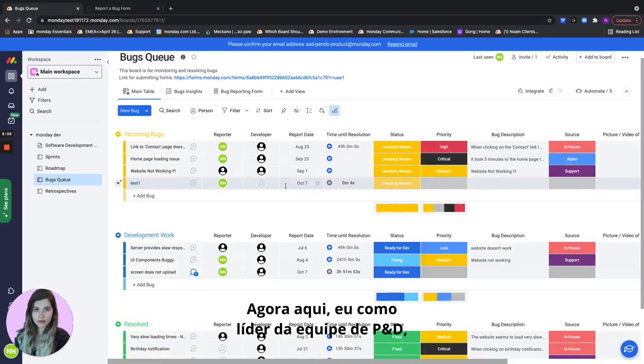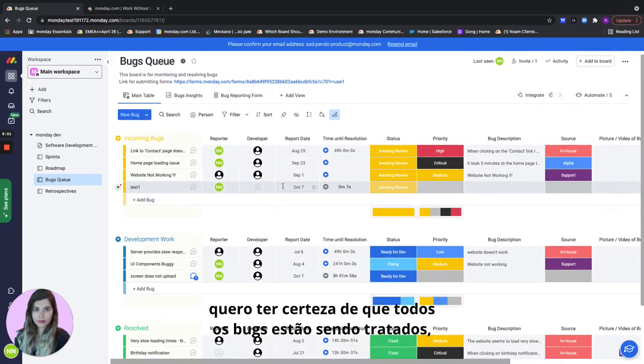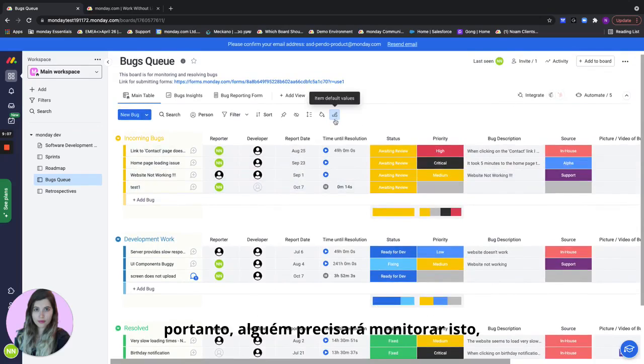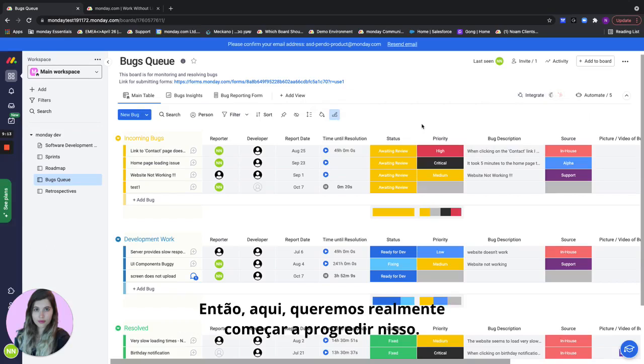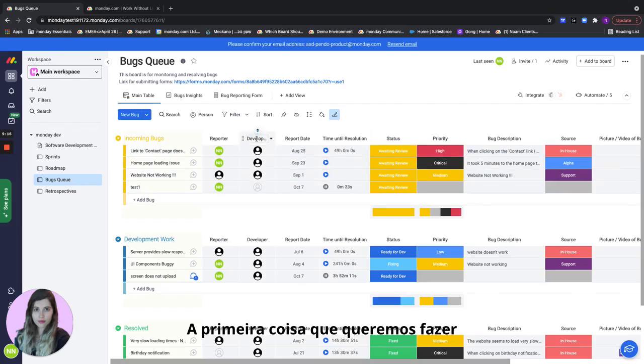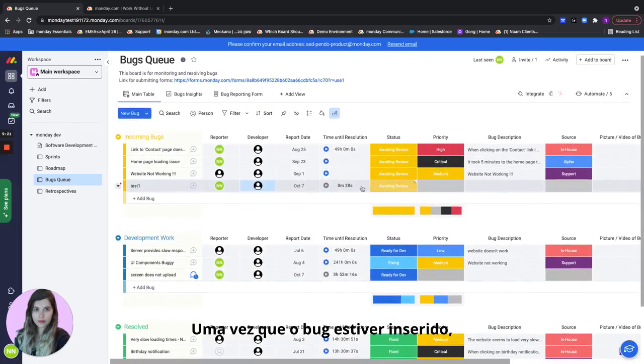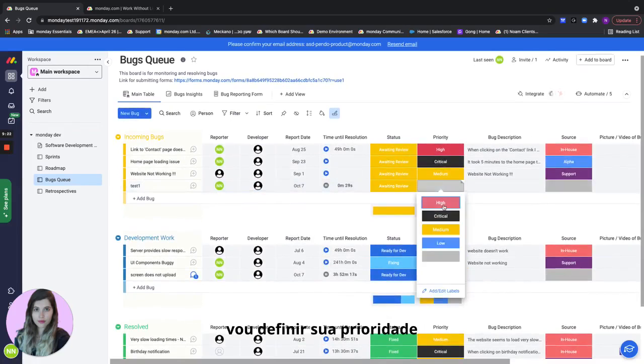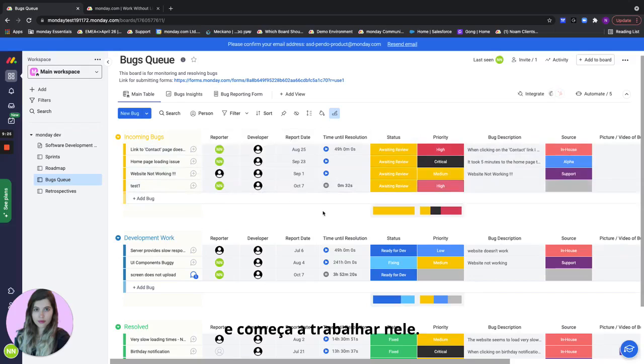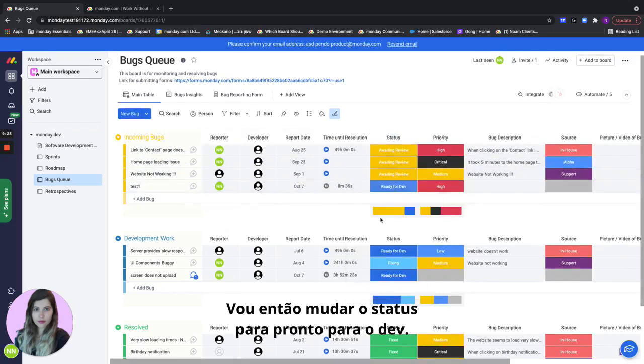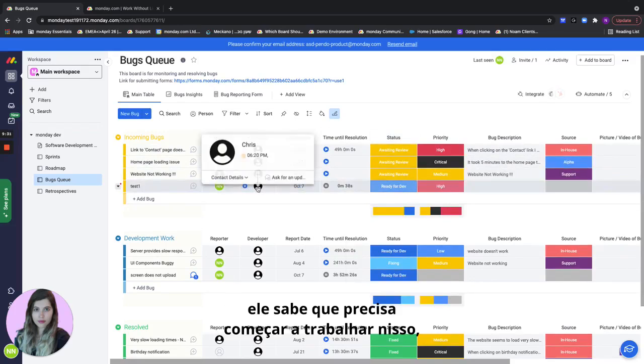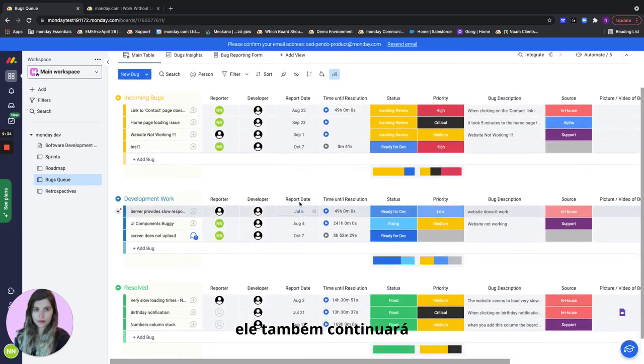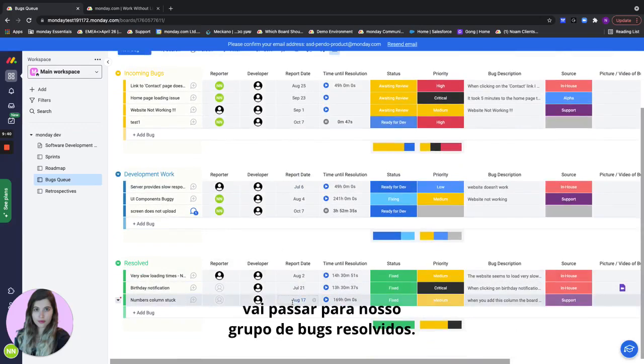Now here as R&D team lead I want to make sure that all the bugs are being handled and I need to decide who will receive these incoming bugs. Someone will need to monitor this or we can create a notification once a new bug has been submitted. And then here we want to actually start progressing this. The first thing we want to do is actually assign a developer to this bug. So let's assign Chris for this one. And then once the bug is in I'll set its priority and I want to make sure that Chris gets it and starts working on it. So I'll change the status to ready for dev. This will give Chris a notification, he knows that he needs to start working on it. It will also move on to our next group of development work. And once it's done it's going to move to our resolved bugs group.